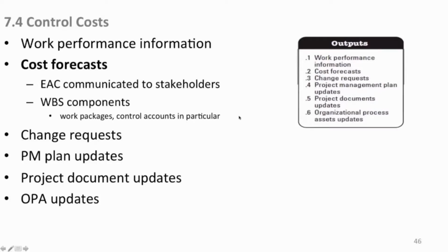Your WBS components, again, you can get down to that level and forecast against them themselves because they could have variance, because you're talking pieces of it now. They could have very different CPIs and SPIs for components and work packages and control accounts than the overall budget, which is good because now you can deal with the ones that are the most problem. I mean, you can get down to really targeting something that you desperately need to fix to the benefit of everything. So that's why you look at that level.